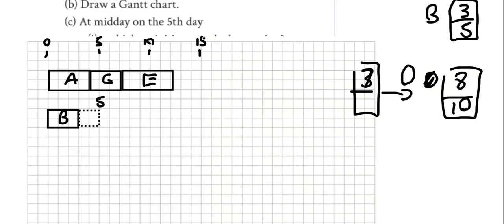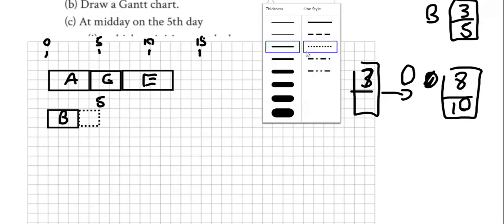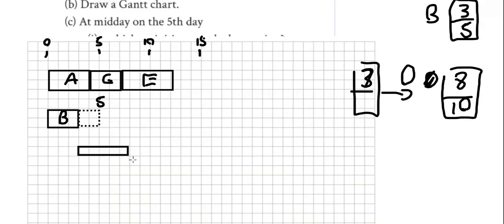So let me see what I'm going to do here. Okay, I'm just going to get my rectangles again. I want the filled in one this time. All right. Here we go. So D, we can start 3 minutes in, can't we? And how long does D take again? Takes 5 minutes, so that would be 3 to 8, wouldn't it? You see why I need the squared paper, can't you? Lucky for me, I can just copy and paste this little one here because it's the same thing again. It can be delayed up to 2 minutes, can't it?